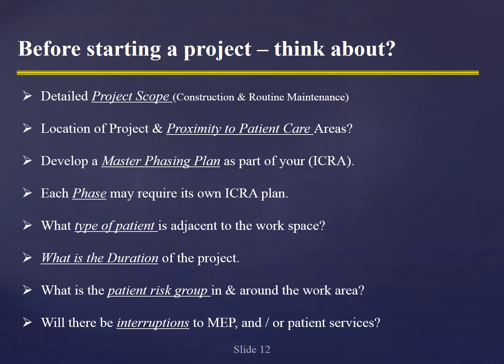Again, developing a master phasing plan. And this is so critical because I think there is a misconception that ICRAs are one and done. However, unfortunately, during projects, they go through phases, and each phase is different, and the ICRA could be different for each phase. And you could require an ICRA for each phase. You could actually have a different ICRA each time.